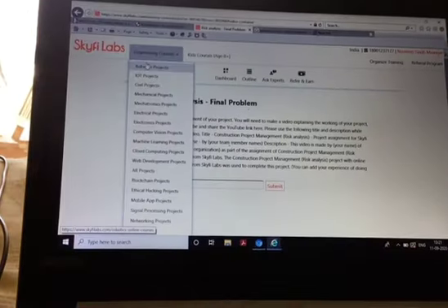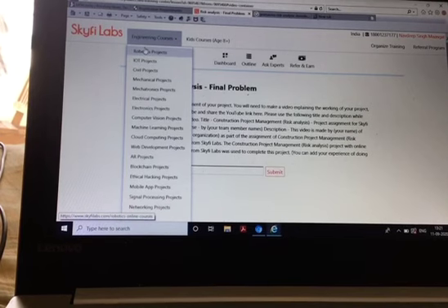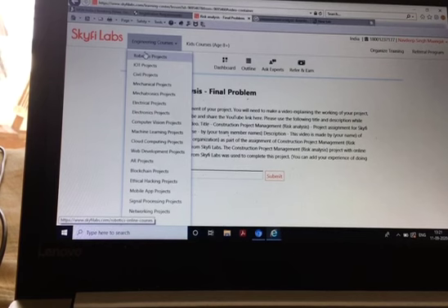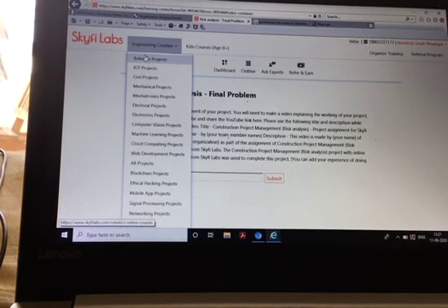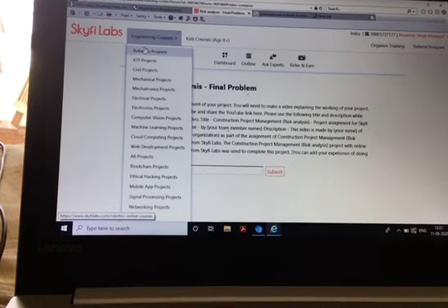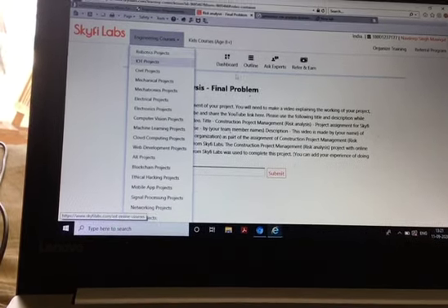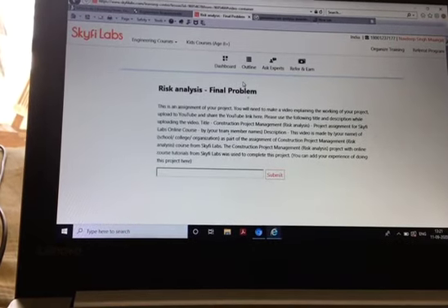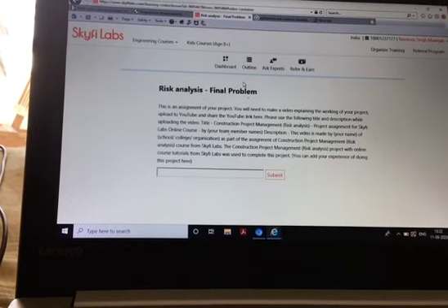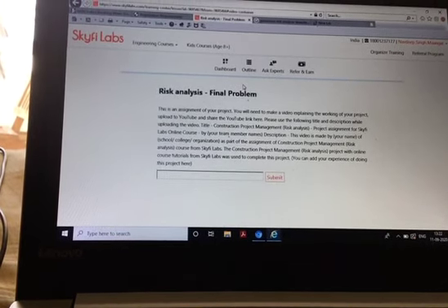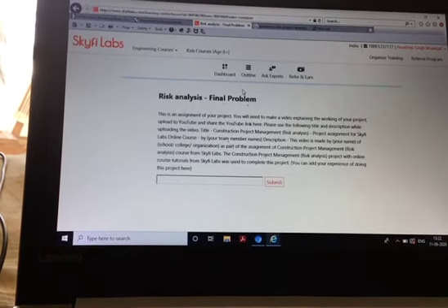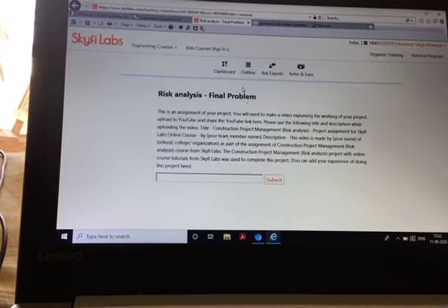So here it goes. First of all, I was introduced to a concept called PERT, which is Program Evaluation Review Technique. It is mostly used to predict a date or a timeline for a project to finish. Then what is the procedure for PERT? It uses three estimate systems. One is optimistic, second is pessimistic, third is most likely. Most likely is mostly the real picture.